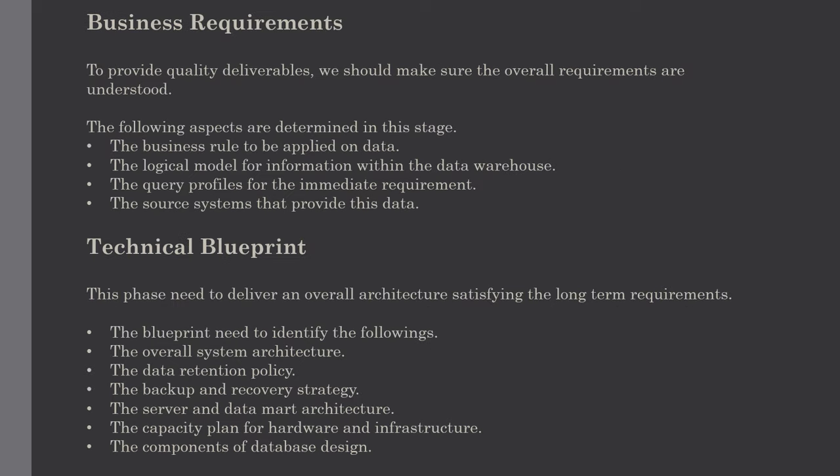The next important phase is business requirements. To provide quality deliverables we should make sure that the overall requirements are well understood. If you understand the business requirements for both the short term and medium term, you can design a solution to fulfill the short-term requirement, which can then be grown into a full-time solution. The following aspects must be determined at this stage: the business rules to be applied on the data, the logical model for the information within the data warehouse, the query profiles for the immediate requirement, and the source system that provides this data.